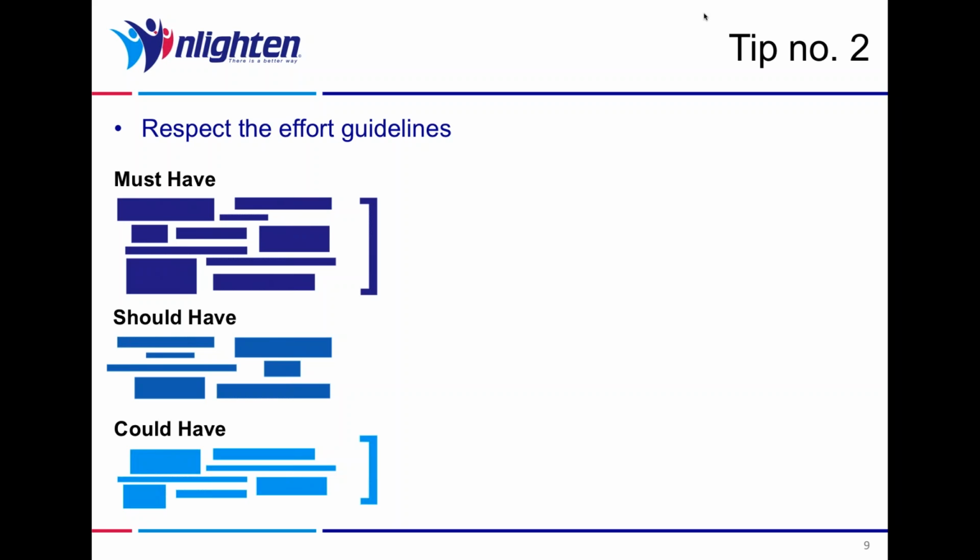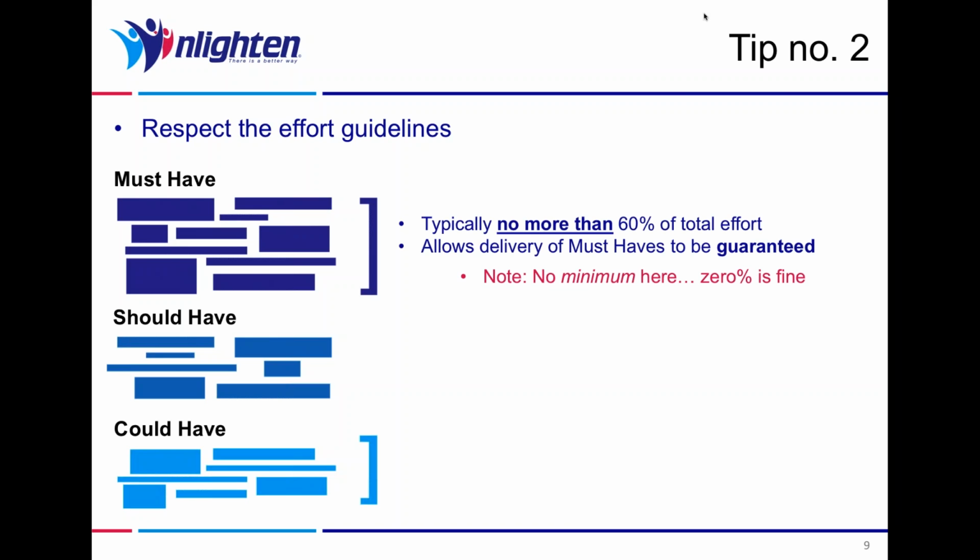So that's our overall objective. It doesn't talk there about what requirements need to be met. We just need to meet the overall needs of the business. And what we should do is we should prioritize and organize the work that is done to deliver the most important features first, ideally. So in terms of our must-haves, remember, we can't de-scope without causing the project to fail outright.